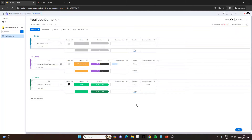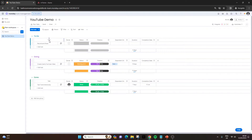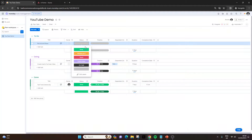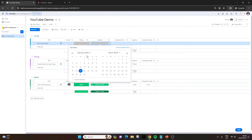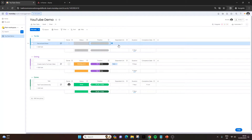I've created a project ahead of this recording just to show you what the tool looks like. It's very clean and user-friendly. The way Monday.com works is all from the main table — you set everything up there and then delve into further views and functionality. I've replicated this in Asana so you can see the exact comparison. I've got three different tasks set up into three milestones: to do, doing, and done. You can add an owner and set the status, and it's all pre-formatted with color coding. You've got the ability to do a timeline, set dates, add dependencies, and the duration is automatically calculated. You can also add many different column types — planned effort, effort spent, budget — and create your own custom columns including links, text, and dropdowns.